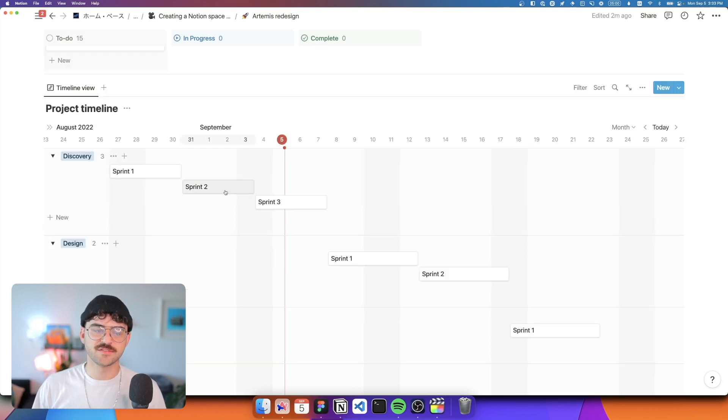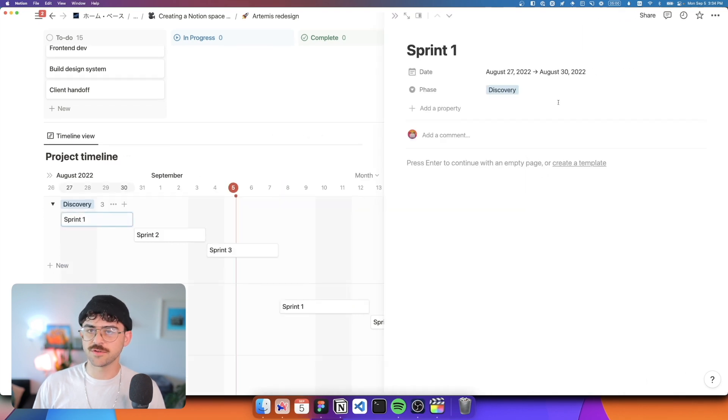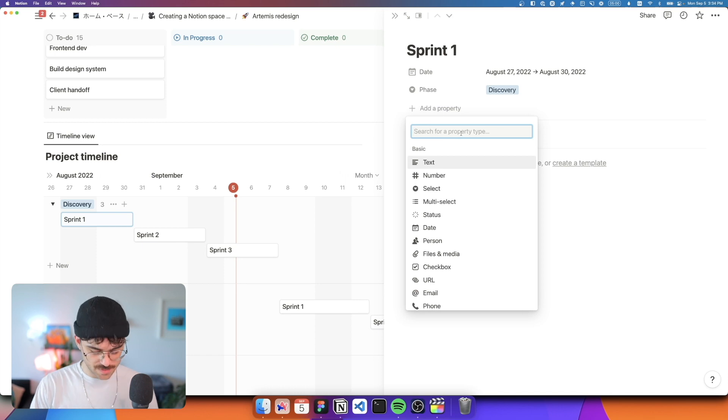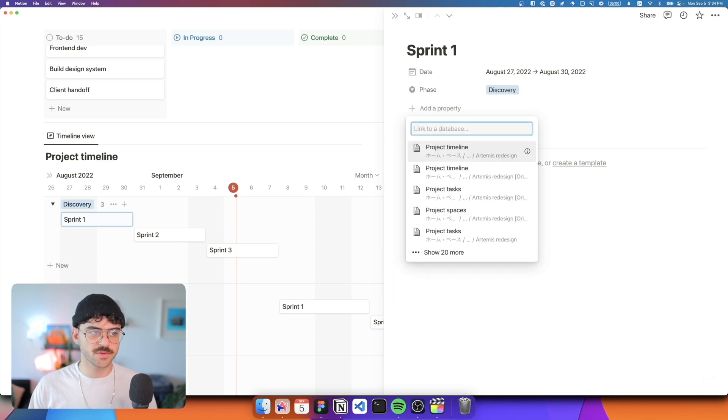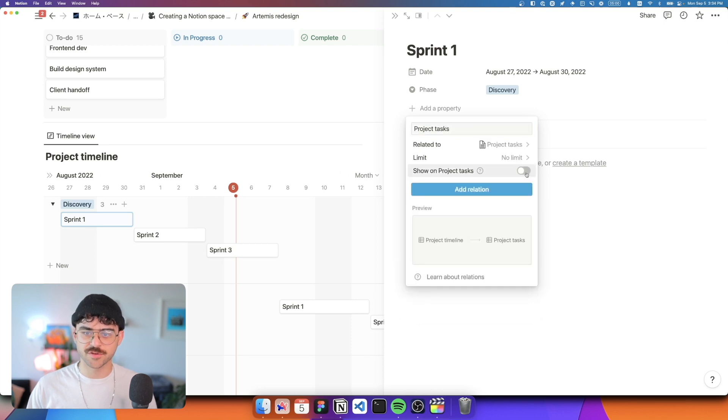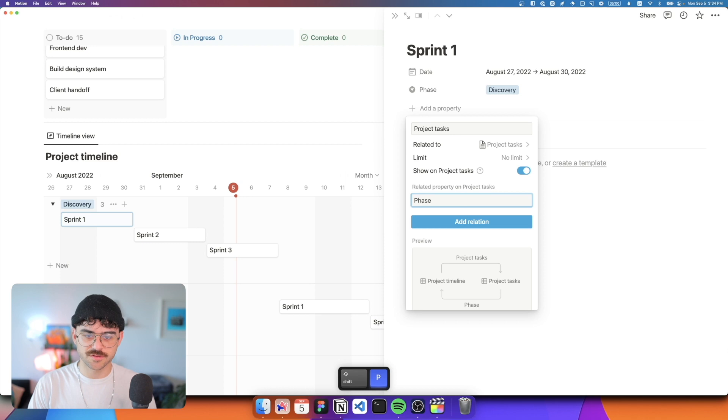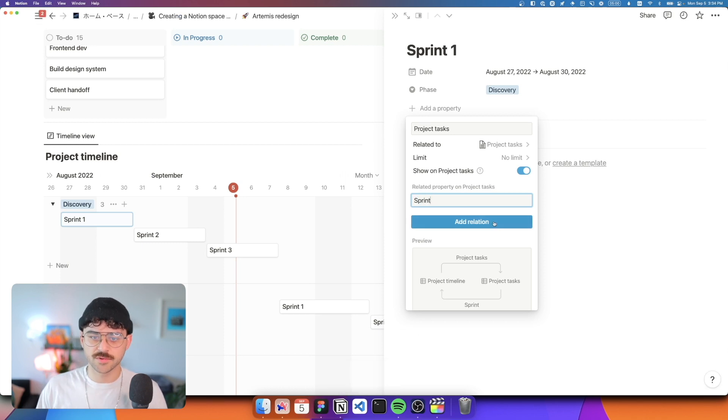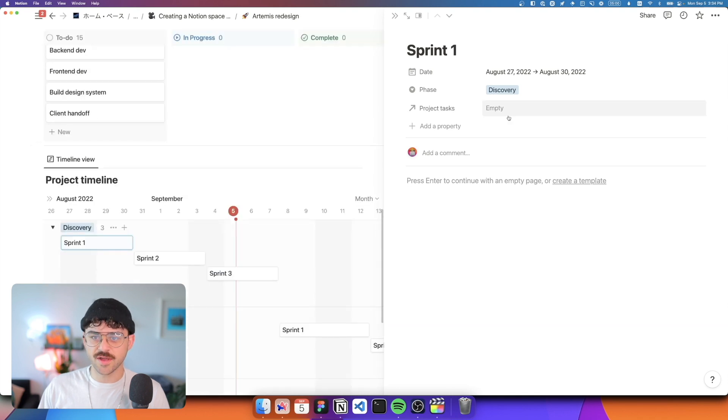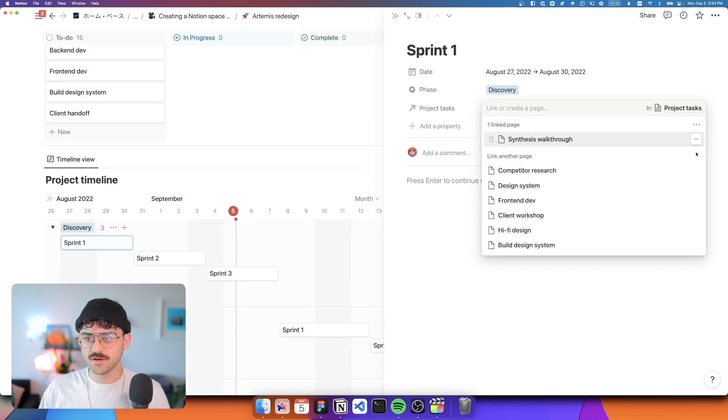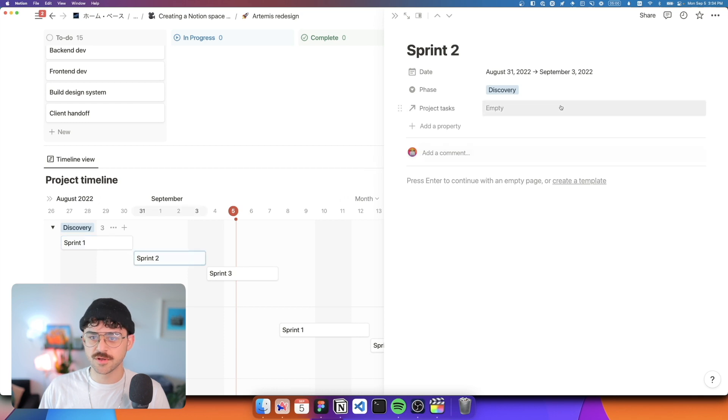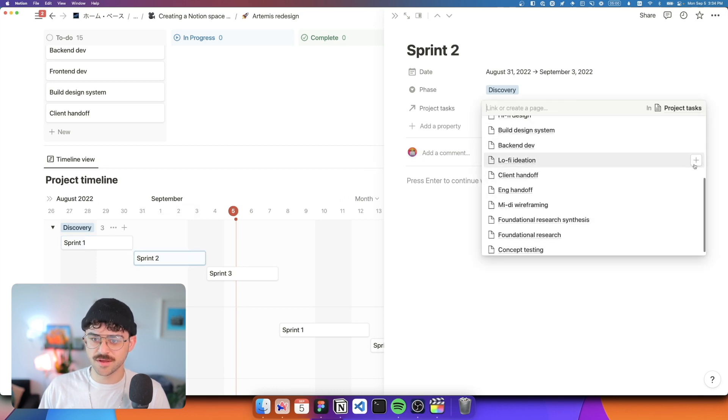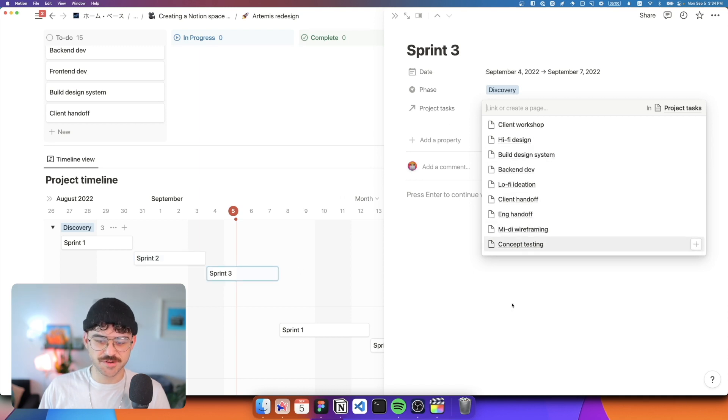So now we want to tie these sprints back to our tasks. And the way that we do that is using relations and eventually rollups. So let's go ahead and add a new property. And it's going to be a relation, it's going to be a relation to project tasks. And it's going to be a two way relation. So we're going to show it on project tasks. And we'll call this sprint, and we'll add the relation here. Perfect. And essentially, what that allows us to do is to just say, okay, so this goes here, and I guess this one too. And then in sprint two, we're going to do some client workshops, lo-fi ideation, we'll do foundational research synthesis, and foundational research.